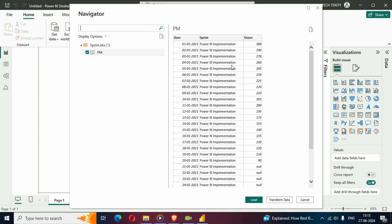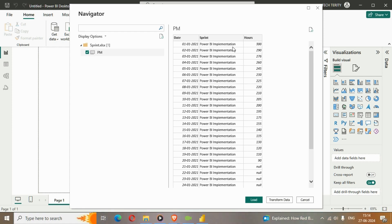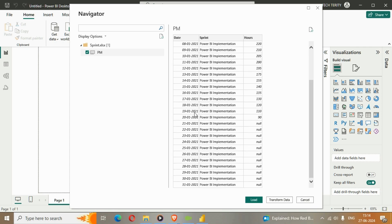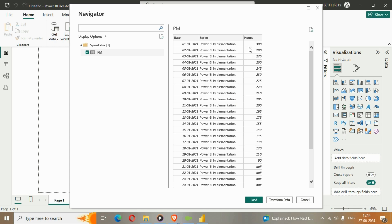Employees need to have hours to complete the tasks. We have a total of 300 hours to complete our project — a Power BI implementation project — within 30 days. If we divide 300 hours by 10, optimally we get 10 hours a day. You can see the burndown here: starting from 300, then 276, then 260, 245 — so it's not exactly 10 hours burned down each day.